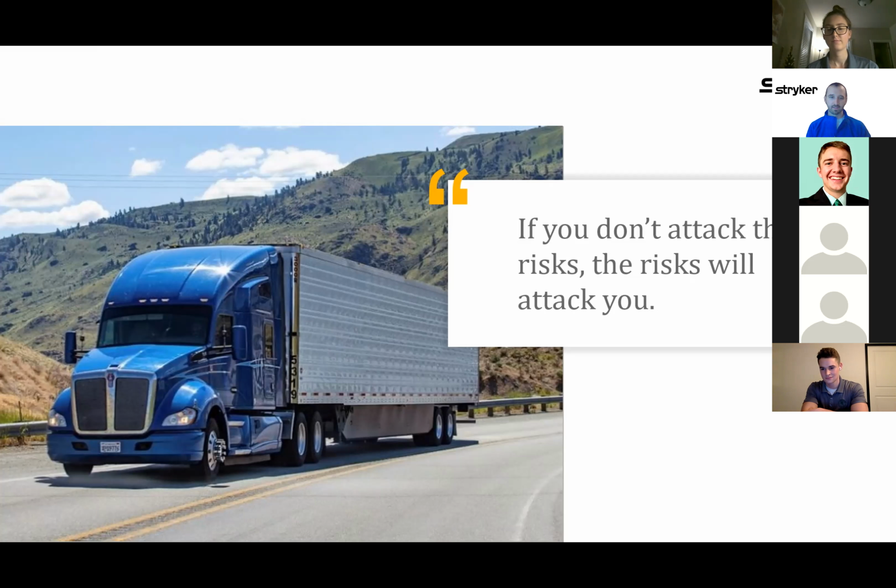And when we go back to Stryker's values, people is number one. So we looked at that and said, we can't put anyone at risk. We are totally stopping this plant. There's a sterilization plant. So we said we can't sterilize there anymore. To qualify a sterilization plant is about $200,000 and 2 to 3 months worth of time. So you look at a business and say, all right, 2 to 3 months, and we lose $1 million a day. So we're going to lose $90 million, and it's going to cost us $250,000. So we're out $9.25 million for this mistake.